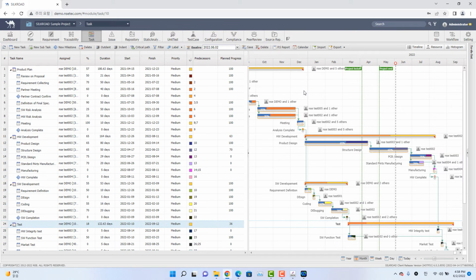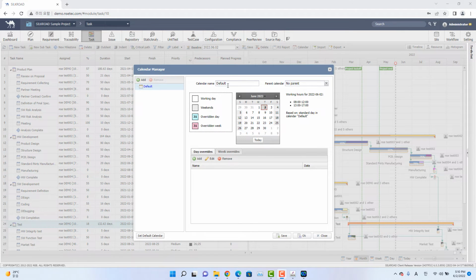of the task or of the project. And on the right side, there's a function called calendar. You'll be able to coordinate the schedule of this whole task system from here. As you can see from the right side, you can decide how long a personnel has to work per day, and the basic standard working hours per day is 8 hours.